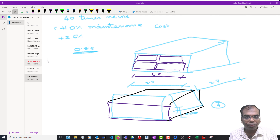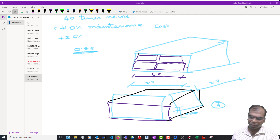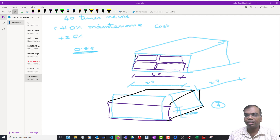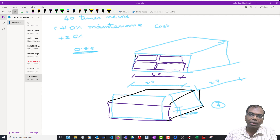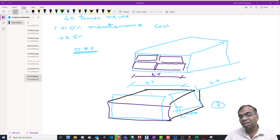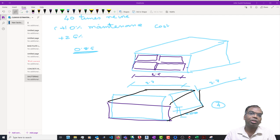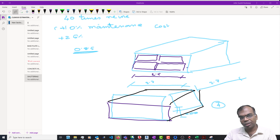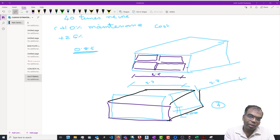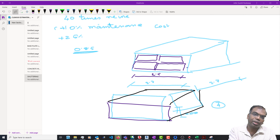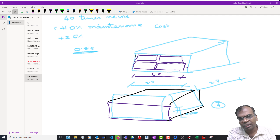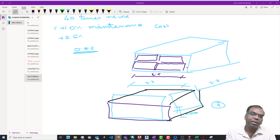If you have any questions, please ask. I hope you found this session useful. When you go for other levels - for slab or whatever other item - this will be the concept you use. Find out what has to go in: for example, shutter release material - is it there or not? If you do not take it into account, the cost is not going to be estimated. So you have to be very careful. The anti-termite treatment is sometimes linked to the PCC, and depending on the system chosen, you can also have it just below the floor.